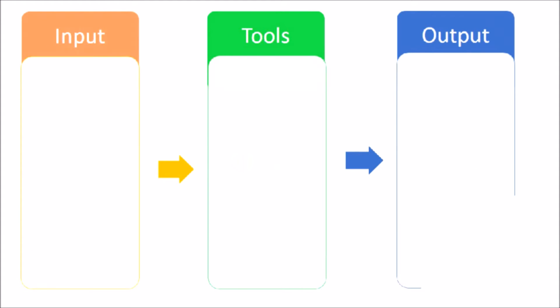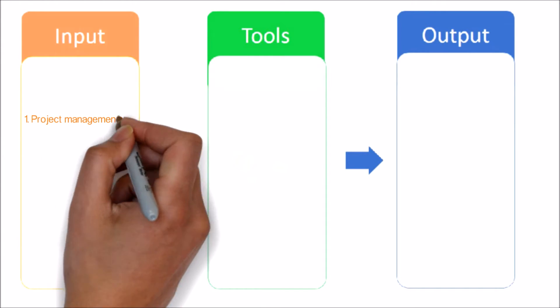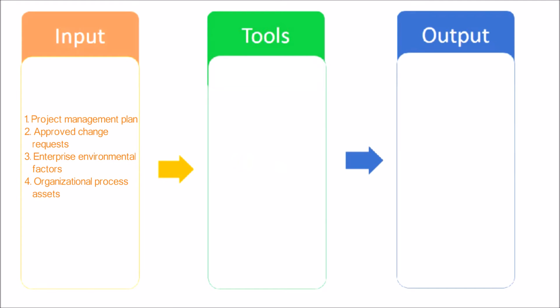Let's see the inputs, tools and techniques, and outputs of the direct and manage project work process. Here are the inputs. Project management plan — the project management plan contains subsidiary plans concerning all aspects of the project. Approved change requests are an output of the perform integrated change control process and include those requests reviewed and approved for implementation by the change control board. Enterprise environmental factors. Organizational process assets.